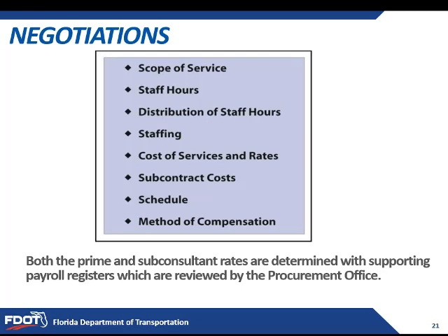Scope of service. Even though a standard scope of service is used, the provisions of that scope are negotiable. The consultant may propose an innovative approach, or the FDOT may have some special concern. Both project managers must understand the scope and be prepared to clarify it as necessary in negotiations. Again, if there are common concerns, a field visit prior to negotiations is helpful in reaching a common understanding of the project issues and requirements.